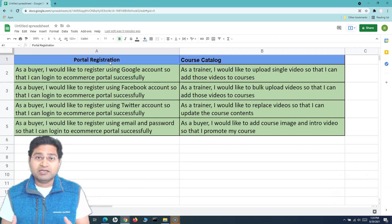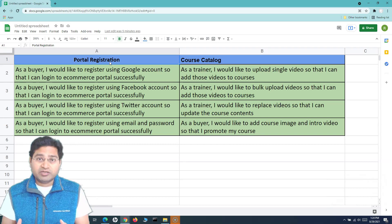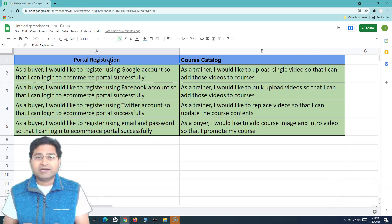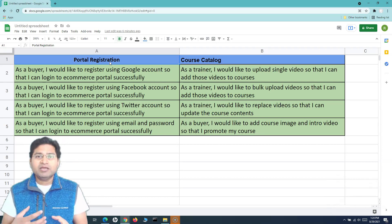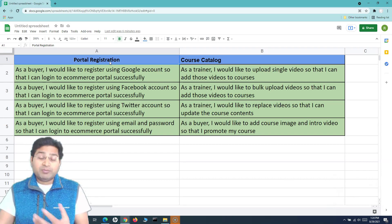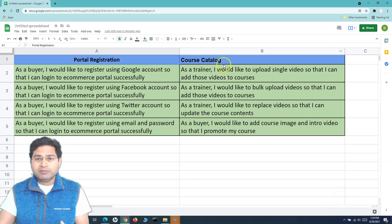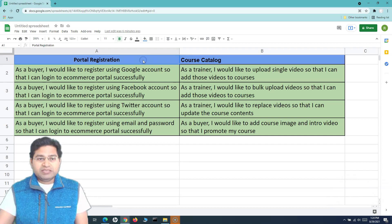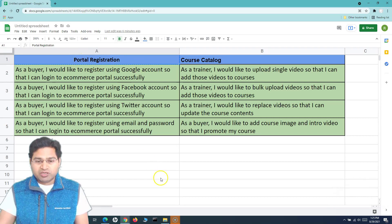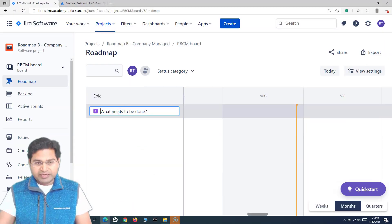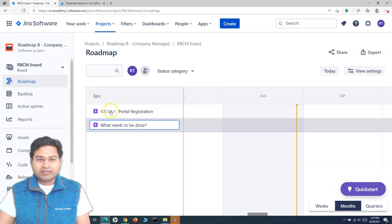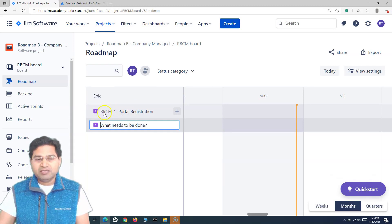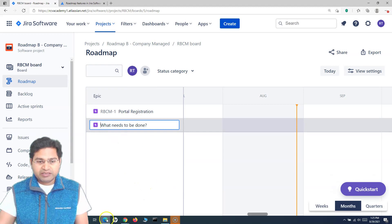Portal Registration will have multiple work items — user stories, tasks, or defects. It's a big piece of work that can have multiple stories. Similarly, Course Catalog is another epic. An epic is a big piece of work that can span multiple sprints or even a couple of months. We'll copy the Portal Registration epic, go to the roadmap, paste it, hit Enter, and that epic gets created with the project key automatically appended.